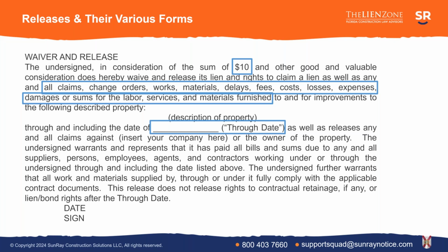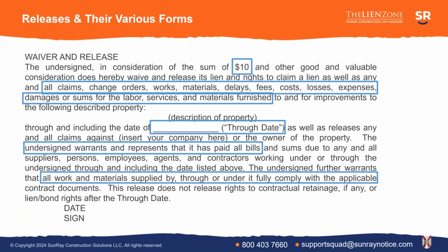You'll notice again that there's a lot of words on this page. It also has some additional representations and warranties that it wants you to make. So this one says that the undersigned warrants and represents that it has paid all of its bills, right? So not only are you saying, in exchange for an amount of money, I'm giving up my rights through this date, you're also verifying that you have paid all your bills. It also says that all work and materials supplied by or through you fully comply with the applicable contract documents, right?